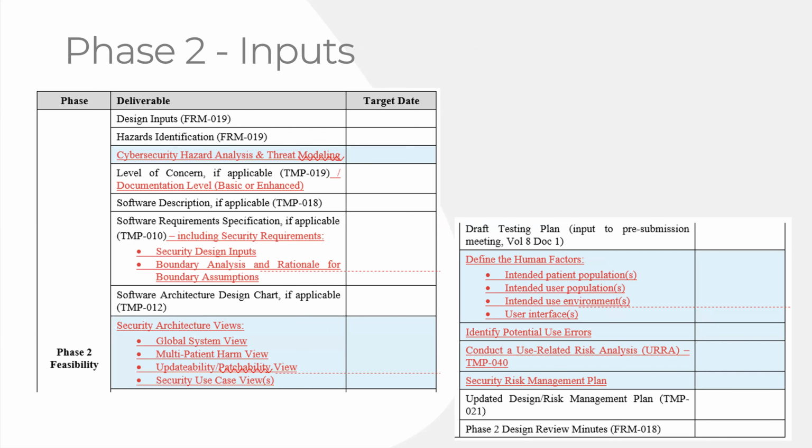Now is the time that you should be scheduling a pre-sub. So you should be preparing that pre-sub. Why do you do it then? Well, now you've identified what your testing plan is. That's right here, the testing plan. So all the tests that you're going to perform for safety and performance of your medical device, you've got that plan now. You've also already started your use-related risk analysis or usability. You started your software, you started security. You've done a lot of things already.